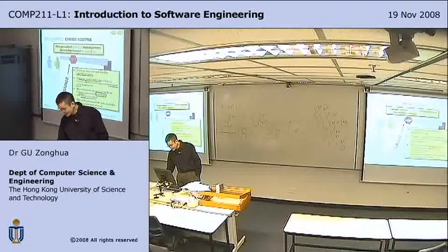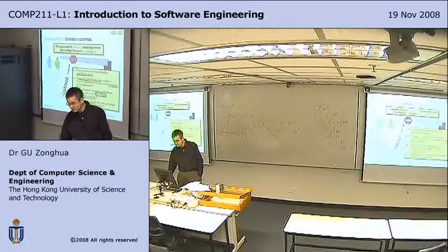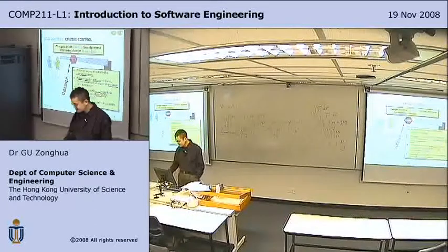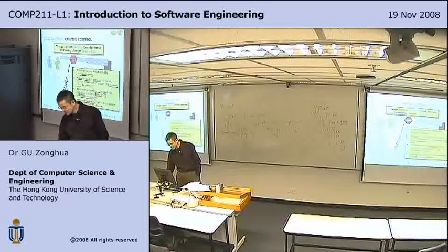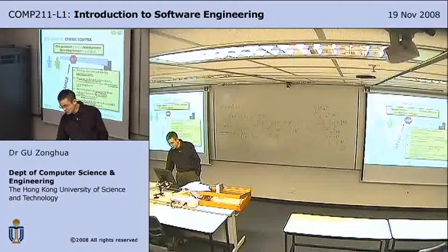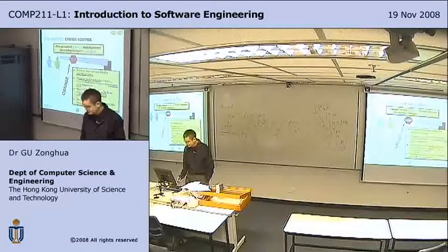And then the configuration item is made available for use. That is promotion. Promotion is when you promote it to become available to all the other developers. Release is when you release it to the users. So this whole thing is called change control. This whole four steps.